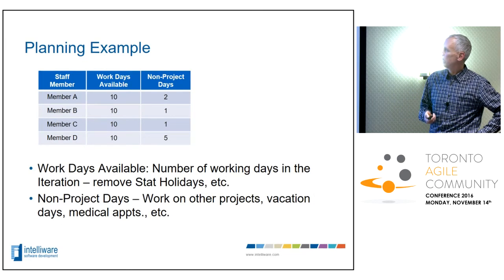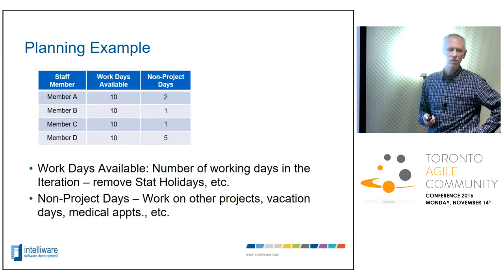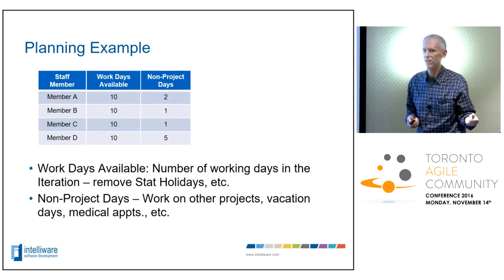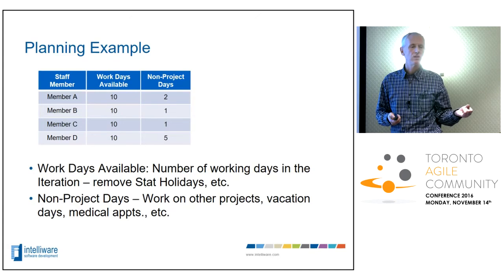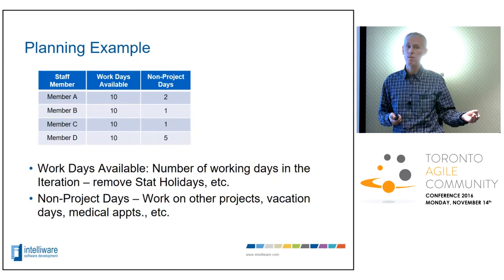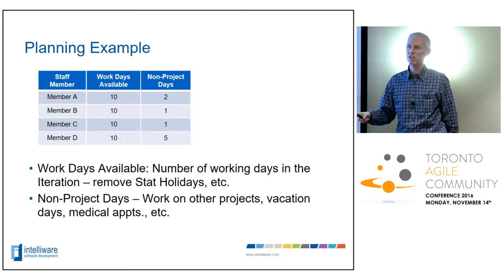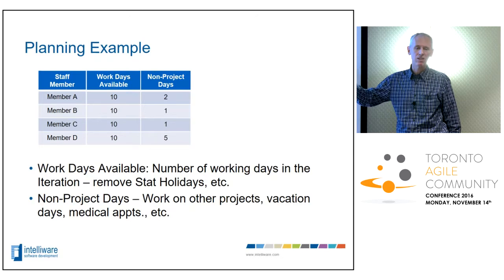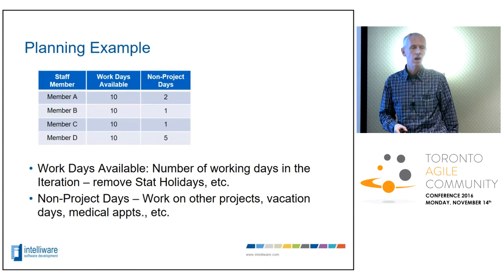So put down the number of work days. This is another key part: non-project days. Again, you're going to get people who might have a vacation day planned during the sprint. They might have to take half a day off for a medical appointment. They may have to go work on another project for a day or two. You need to take that into consideration because that's time that they're not able to work on the effort to do the stories within your project.